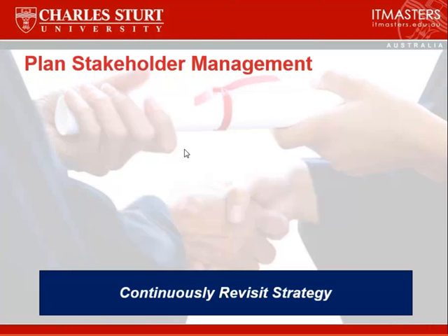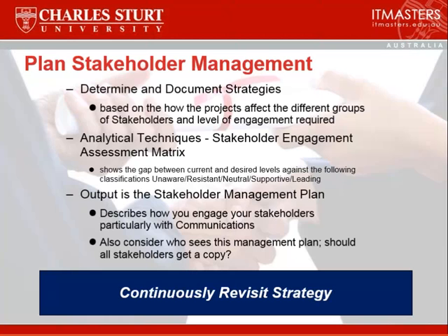Plan stakeholder management: having identified them, you then plan the strategies that you're going to adopt and apply to managing and engaging those stakeholders. So we have analytical techniques that we can use to show the gap between where the stakeholders stand at the moment and where we want to bring them to as we're going through the project.